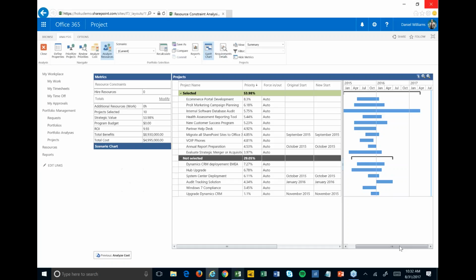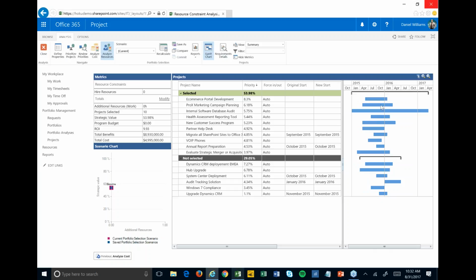And this is a huge problem in a lot of organizations. We go, yep, executive A says we want to do this project, and they fund the money, and it goes time to start working on the project, and we go, crap, everybody's over allocated, we don't have resources. Now we got to go scramble back and try to figure out how we're going to pull this together, and then the project gets delayed, and so on and so forth, right? So what I'm looking at now is I can start to create a top-down portfolio resource plan at an earlier point before we get there, to try to help mitigate that risk and avoid as much of those issues as possible, right?